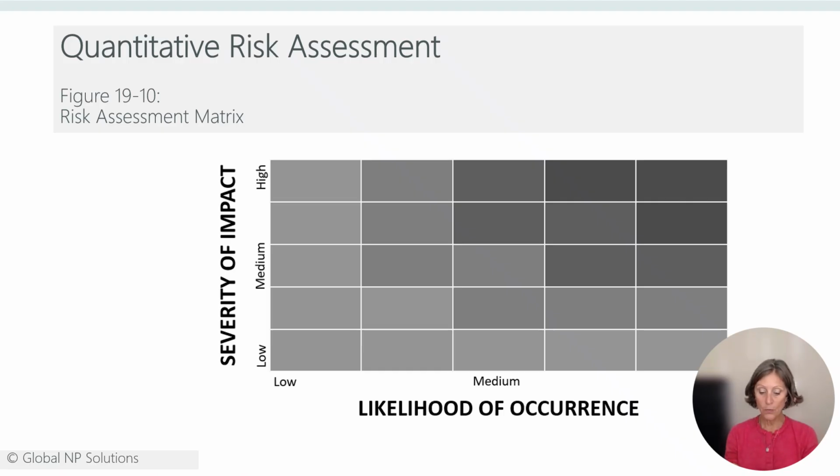Project variables are reassessed to ensure risks with highly negative results do not occur. Chief engineers work with specialty functions to manage new product trade-offs between risk and cost. Typically, the majority of risks for which the group needs to create mitigation plans fall within the center diagonal of Figure 19-10. These are items that have a medium to high probability of occurring with moderate impact or have a medium to high severity prediction coupled with moderate likelihood of occurrence.